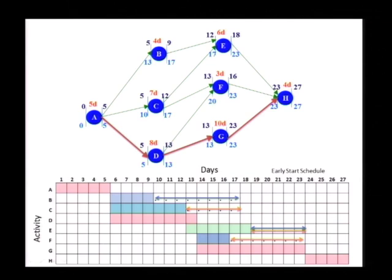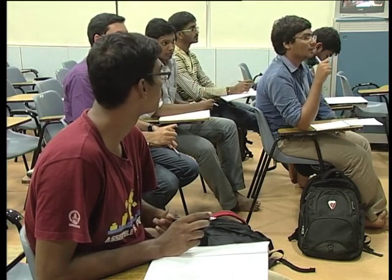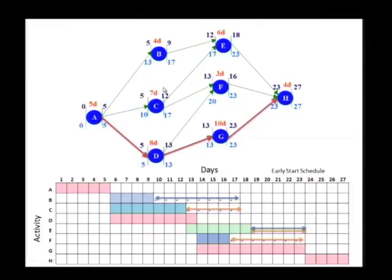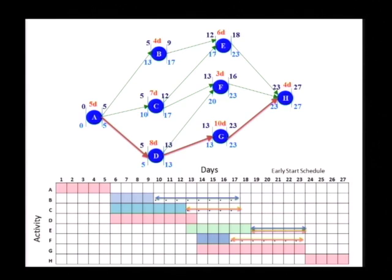So if I was going to think of an equation for independent float, what would it look like? It is the minimum of early start of the successor, minus the maximum of late finish of the predecessor, minus the activity duration. So the formula is: minimum early start of successor, minus maximum late finish of predecessor, minus activity duration. The challenge is you will have to look through the predecessor-successor relationships, make sure you identify them properly, and then do this calculation.